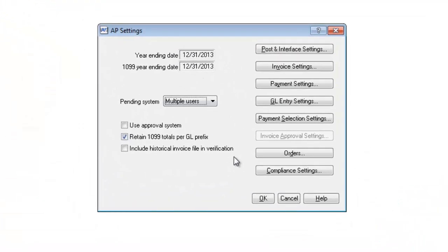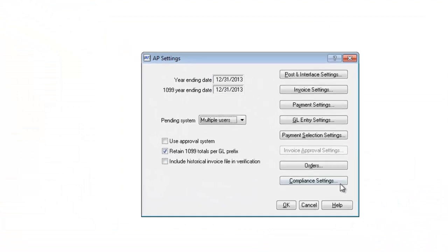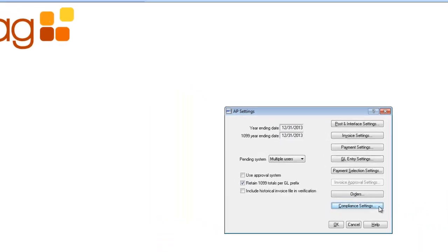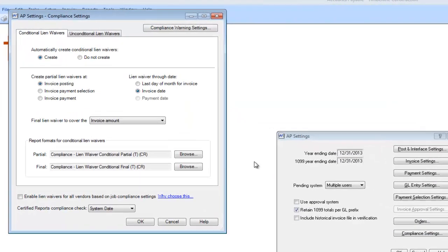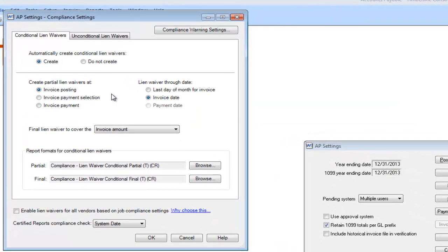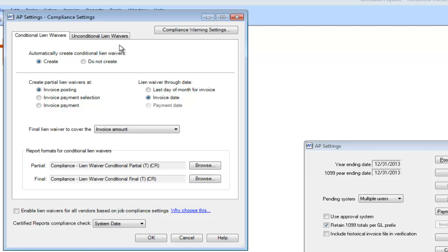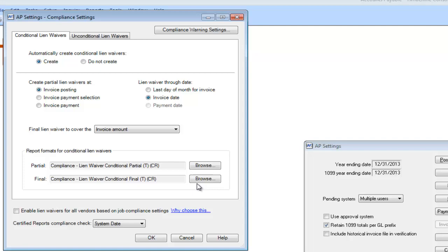Once you do so, you'll see a button down at the bottom called Compliance Settings. Here you can decide whether or not you want the software to automatically create conditional or unconditional lien waivers, or both. Decide when you want it to create those lien waivers, what the through date of those lien waivers are going to be, and what the final lien waiver is going to cover, whether it be an invoice amount or the total commitment amount. You can also determine the form that is going to print from your subcontractor compliance.